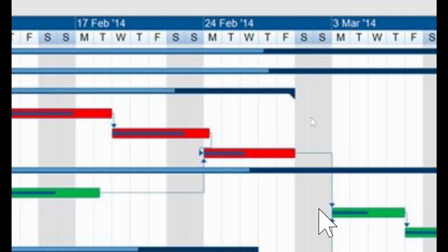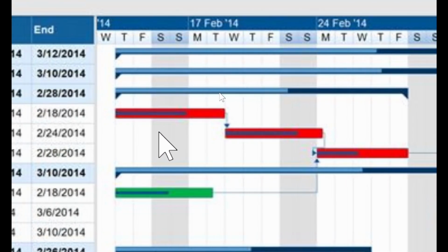You also plan for holidays and any day that work should not go on. So the Gantt chart here will analyze the entire project from the start to finish, and any day that workers are not supposed to come to work, it will highlight those days in gray.